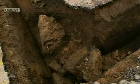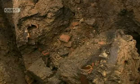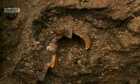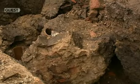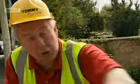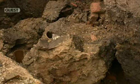Well, it all seemed to be going so well, probably too well. We were on the last stretch, and of course, he got a bit overconfident, phoned up and booked the concrete, and while I was on the phone, crash, we had a fall in. What that means in effect is the sides underslipped. It slipped from underneath, and it just brings in a load of material either side of the trench. All you can do is scoop all that extra waste material out, get a few extra skips to take it away, and then pay for extra concrete to fill that hole that you've just created.